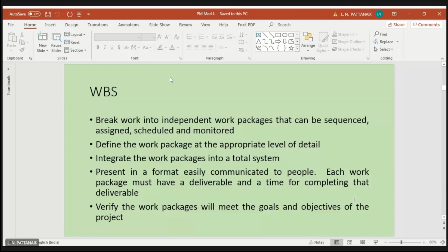Right? You have to estimate, although it may not be exact. It is very difficult to find the exact time for an activity. You cannot say what is the exact time it will take to complete the foundation work. There are many uncertainties involved in the activity. But you will try to give as close as possible, using your own estimates or experience, etc. There are various means of finding these things like work study, time study. They used to be applied in these kinds of processes. There is some historic data that this kind of work used to take this many days. So based on some kind of input, you have to ascertain the time for these activities.